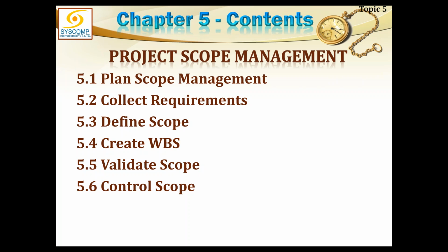Then this baseline and the management plans form part of the project management plan. The project management plan, as per integration, will be executed by the integration in the process direct and manage project work. Therefore, scope does not have any process in execution of its own. But in monitoring and control, we need to have a complete control from all the knowledge areas except HR. So here we have two processes from scope. One is called validate scope and the other is called control scope.